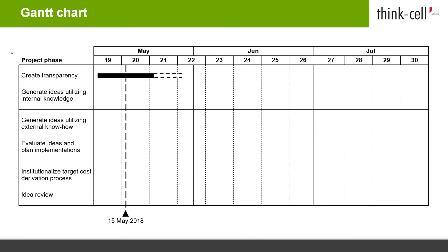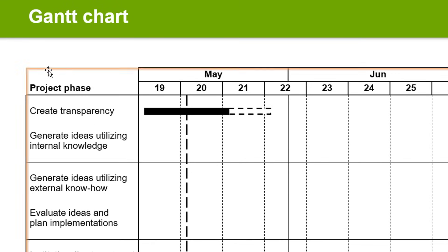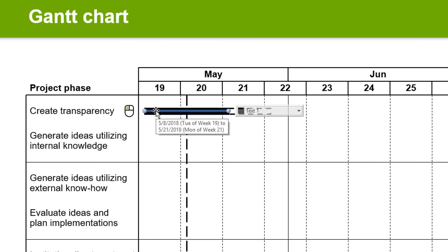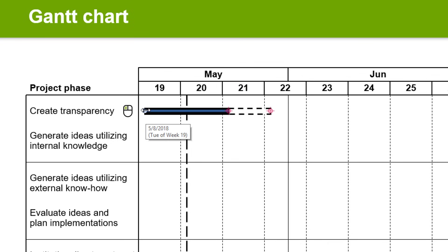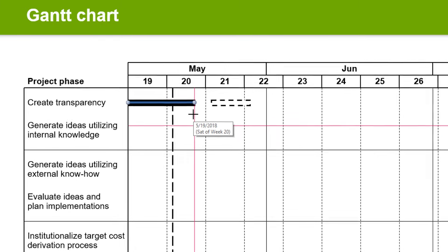Now let's move on to the Timeline items. This is an activity bar — it visualizes the duration of a task. Click onto the example bar in your first activity row to select it. Click on each end of the bar, then click and drag the left handle towards the start date of your activity. A tooltip will show you the exact date of the current position. Release, then do the same with the right handle to set the end date. Now you have successfully placed your first Timeline item.